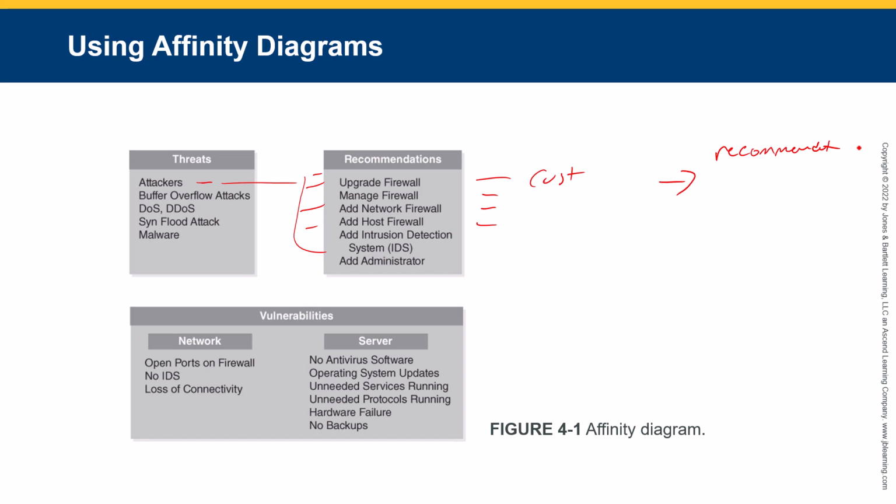And the vulnerabilities, same thing. We could identify the different sets of vulnerabilities, and then we could figure out the appropriate costs for mitigation, and then we would figure out which one of them would be the appropriate recommendation for each identified vulnerability. Because each identified vulnerability will have associated costs and risks. From there, we would probably take 3 or 5 individual risk options or vulnerabilities, the risk for that vulnerability. From there, 3 to 5 risk mitigating techniques. From there, selecting and recommending one.